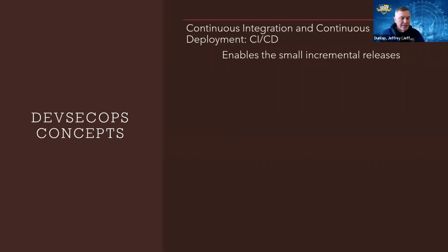I may have mentioned to you, I think last week, I said you can't go from waterfall to DevSecOps. It isn't a one-piece move. If you want to be successful, you've got to go from a waterfall methodology to an agile process, and then DevSecOps. Can you do it? Has it been tried? Sure. If you want to be successful and you're using waterfall and you think you need to change, your first step is how do I actually change the development process, and then we'll get the rest of this.